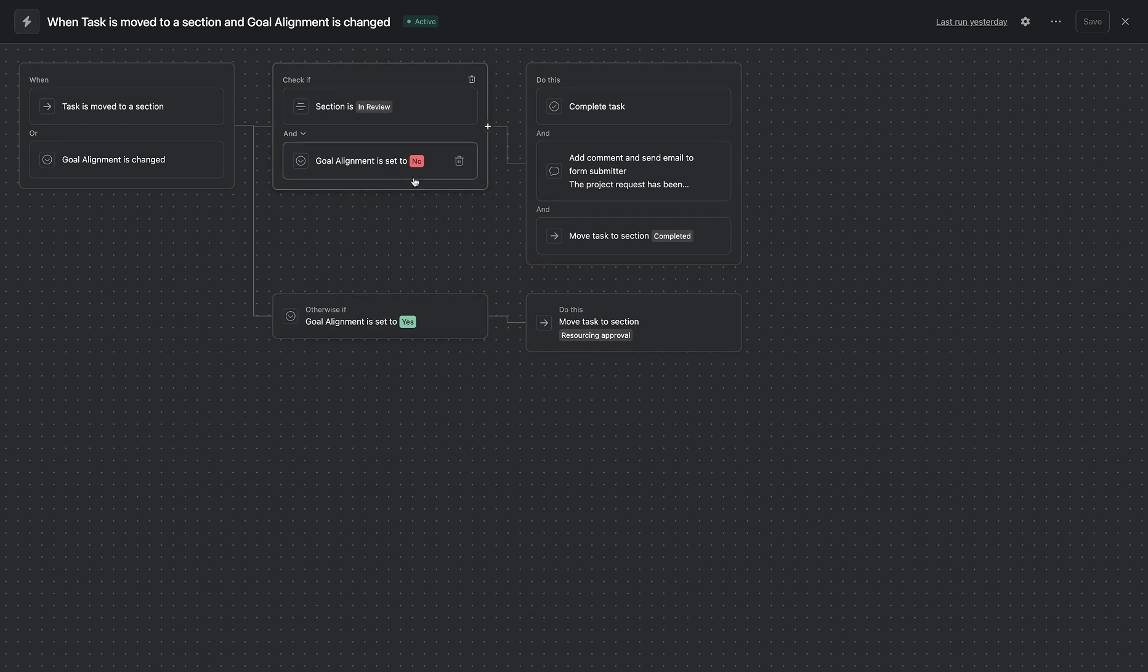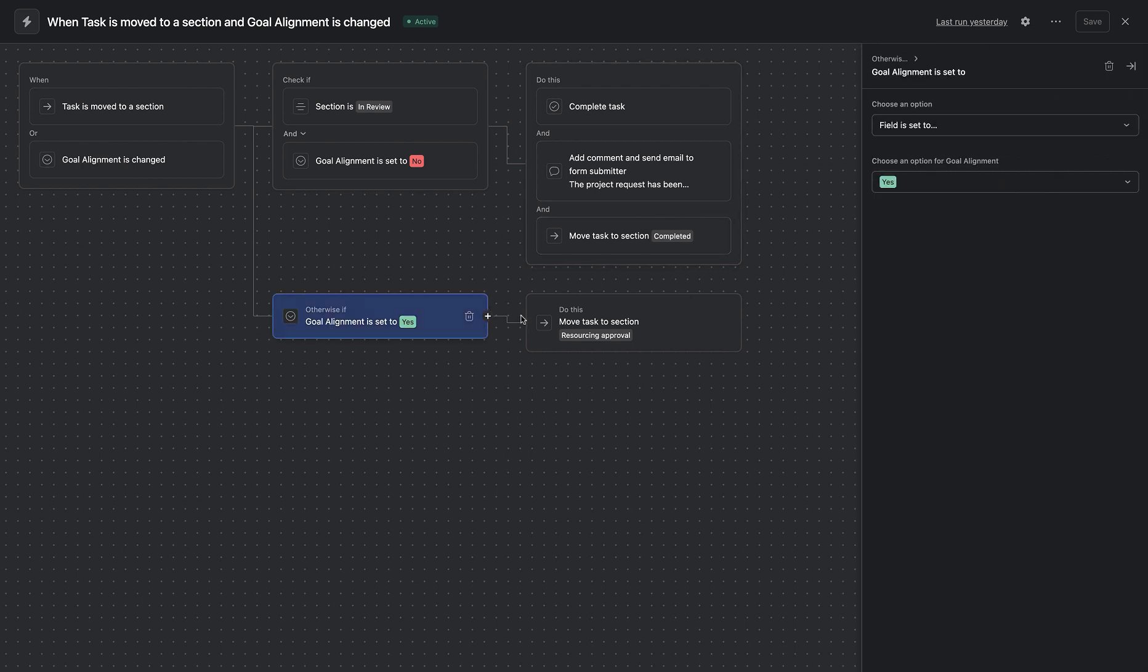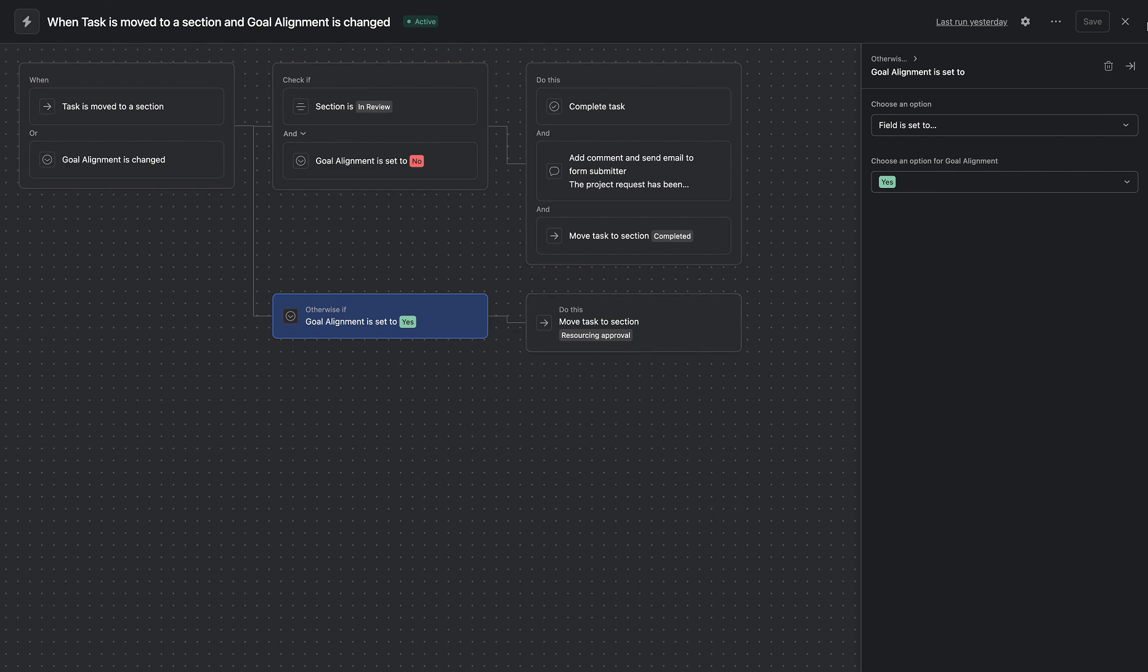where we figure out whether that project aligns with the company's goal, or yes, and if it does not align with the company goals, this particular condition will be met, and these results will be published. Otherwise, if it aligns with the company code, we will be moving it to the next phase.